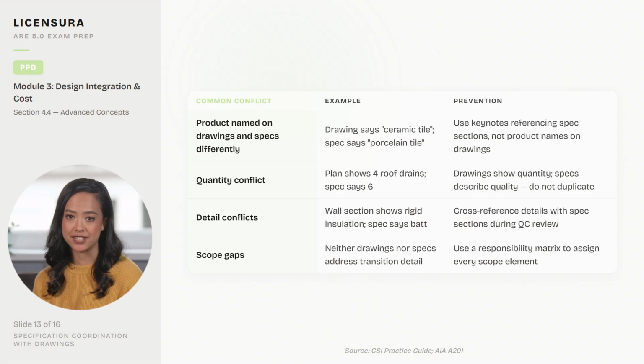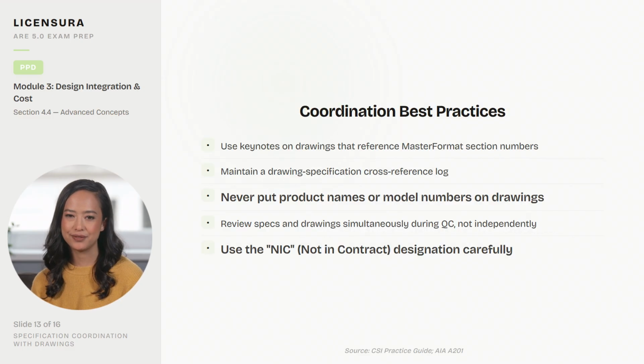Market-driven changes, when estimates exceed budget, may require redesign at the architect's cost under AIA B101. Scope creep from gradual small additions must be tracked and documented with additional services requests when the cumulative impact becomes significant. This list provides 6 design phase risk management practices.